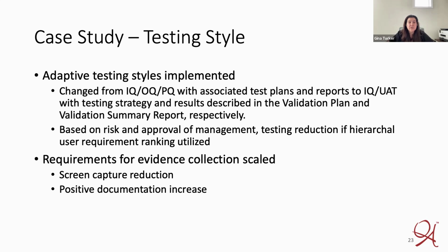Instead of the traditional IQ, OQ, PQ approach with separate plans for each phase of testing and separate reports for each phase of testing, they chose to go with an integrated IQ UAT approach and then remove the requirement for individual plans and reports and included all of the instruction for testing in their validation plan and all of the results of testing in their validation summary report.